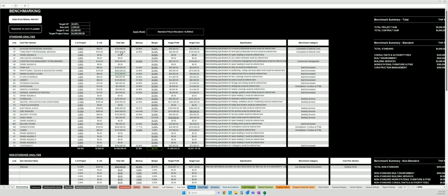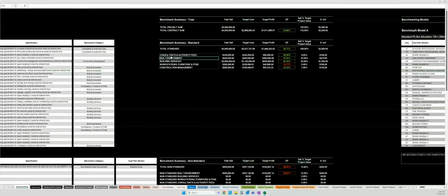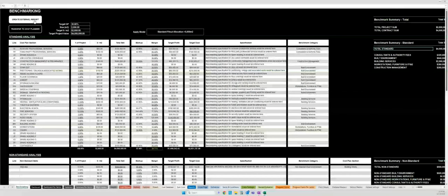You're working early with the client to understand the packages. You're working with big numbers here. You're analyzing on large elements to make sure that the project is roughly sitting in the right area. You're reporting that out to the client and potentially working with them on it. You're then transferring that to the cost plan to create all of your cost planning reports, and you're snapshotting benchmarks as a line in the sand as your starting point for projects.